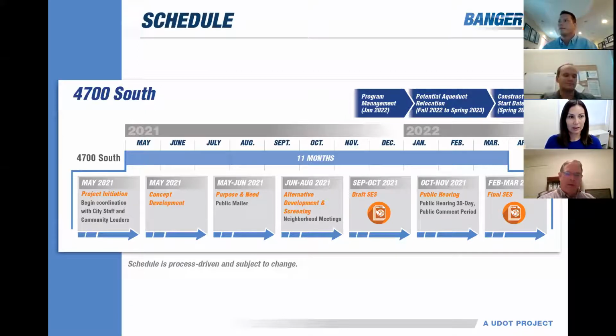The timeline, the minimum requirement under the federal and state laws is 90 days to give notification. Certainly with businesses, we understand the complexity of moving and we will try to give as much time as possible. And usually we plan that there's going to be a much longer lead time to accommodate that.